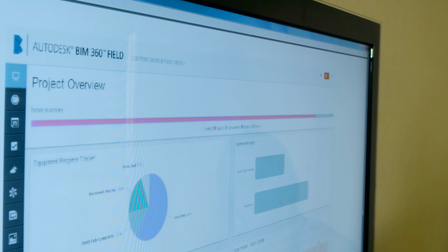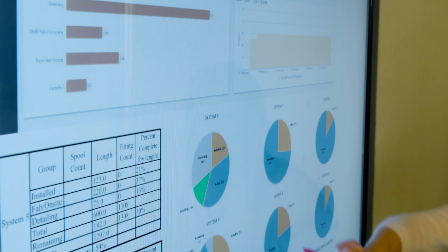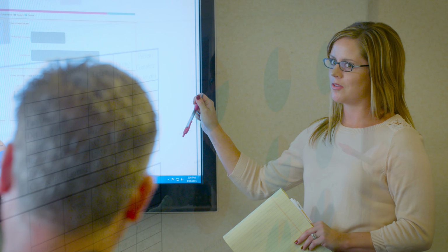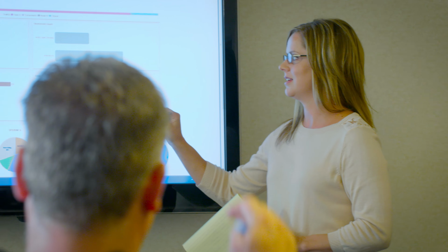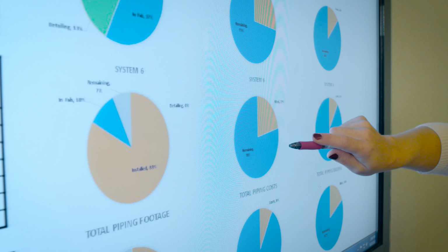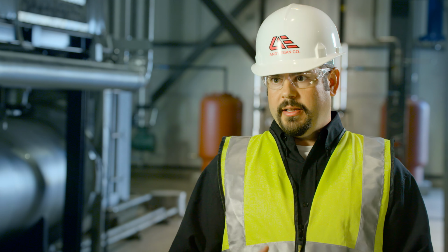Managing change orders with BIM 360 Field becomes easier because we now have real-time documentation that we can show transparently to the customer. Fabrication is pre-planning. When we pre-plan, we build these components early on in a project. So it's understandable that if we stop a process halfway through, there is a cost impact. This is the documentation to back it up. If we don't track these things and really monitor every single piece and component very carefully, we don't find those issues until the end of the project.